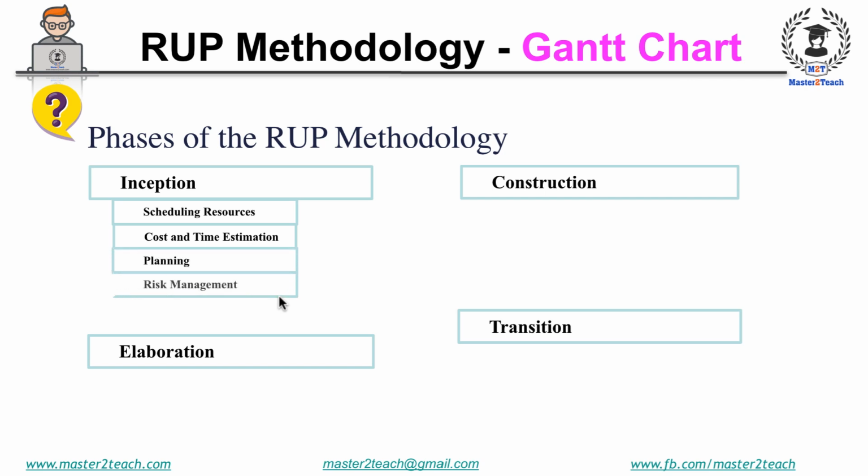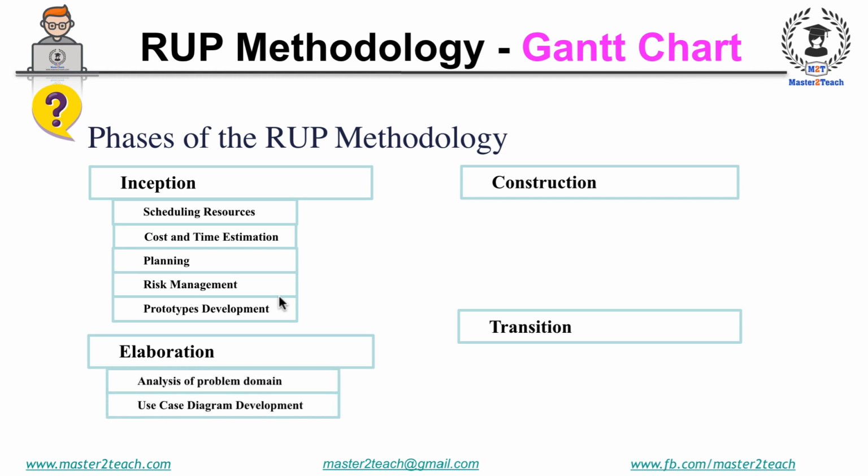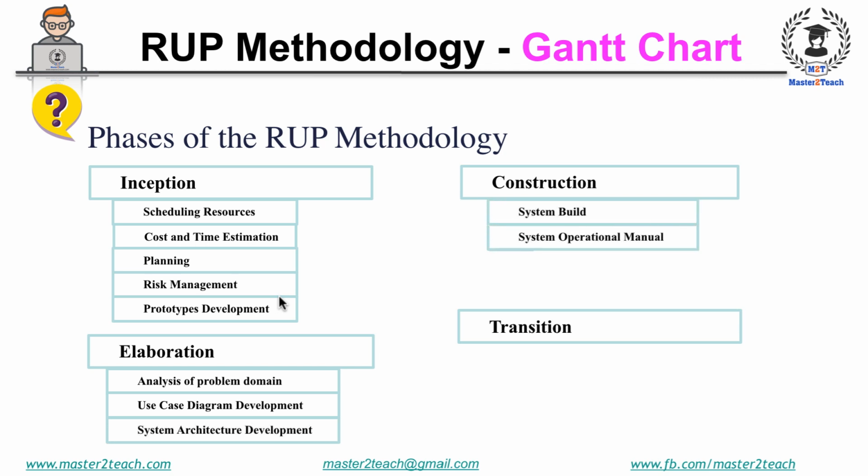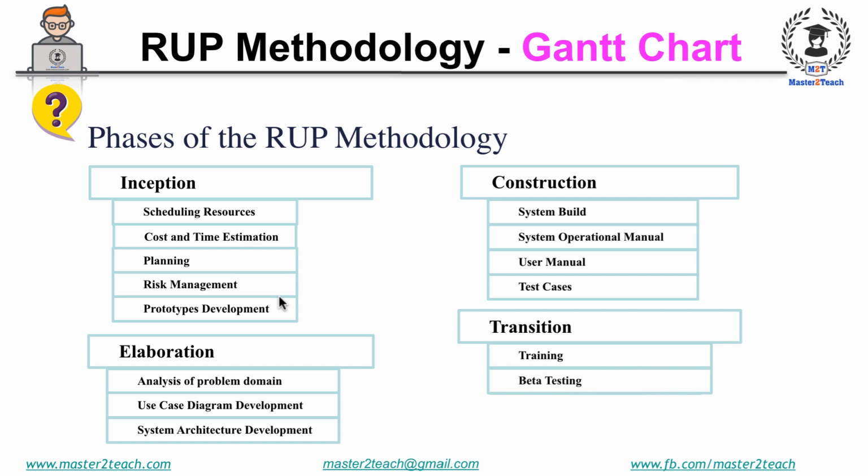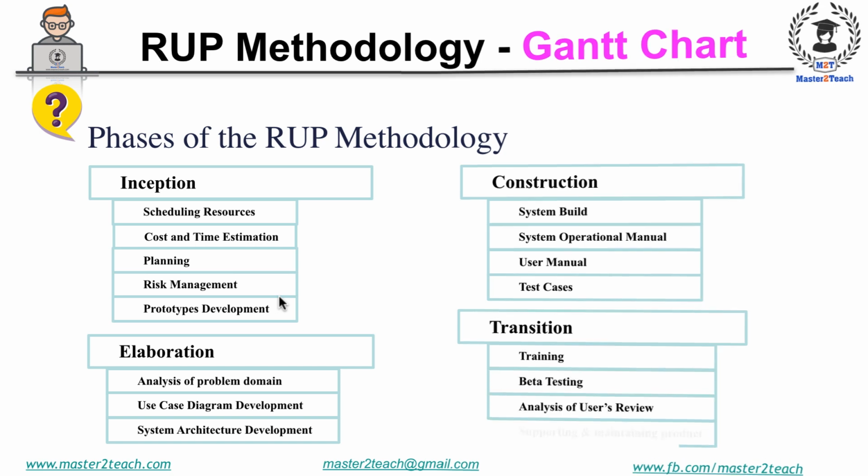Of course, we know that we can't go into development without system design, but in this methodology, we will not wait for the whole system design to be finalized. As one module's system design is finalized, the developer starts working while other designers start to design the next modules, so that there will be more overlap in the execution. In the waterfall, we start development only after finalizing the whole system design.